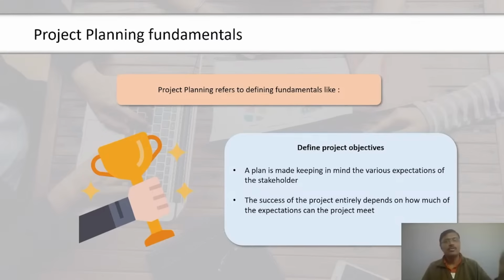Process analysis involves using lessons learned from the initial few work to make the remaining work more efficient. For example, if the project involves installing a software package, then a lesson learned from the first few installations can be used to improve the process on remaining installations. Apart from these, all the quality management and control tools, such as the 7 basic quality tools, will be relevant to this process.